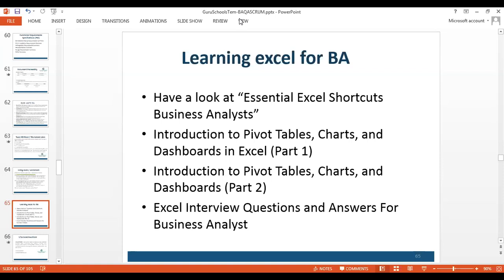And basically you will have around 8 to 9 such agenda items included in the minutes of meeting as action items, even for the client side, whoever is leading the client team. You can pin it on his shoulders, saying, okay, Mr. Keshav, senior VP HR in State Farm, has to come back to me with these numbers, like how many employees you have in these 3 offices, how many gates or how many input output vents or doors where we need to have this solution implemented, and so on and so forth.